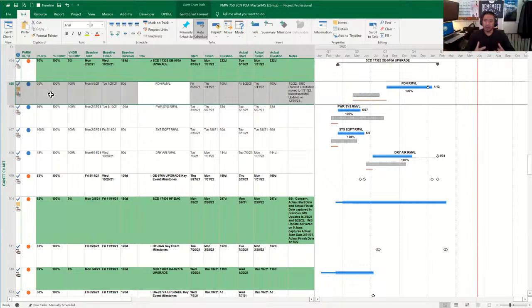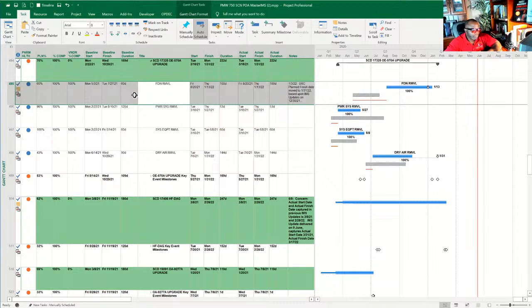So that's why I encourage more of using deadlines instead of leads and lags. And it doesn't affect your critical path, because it's just specifically like a marker, put it that way. Versus using a must finish on or one of those.